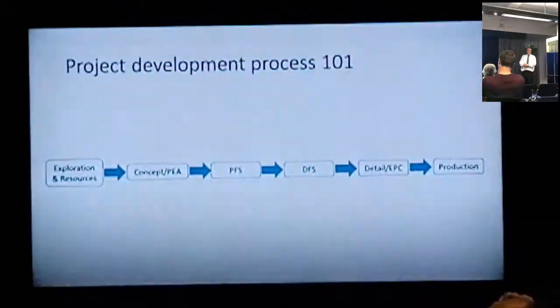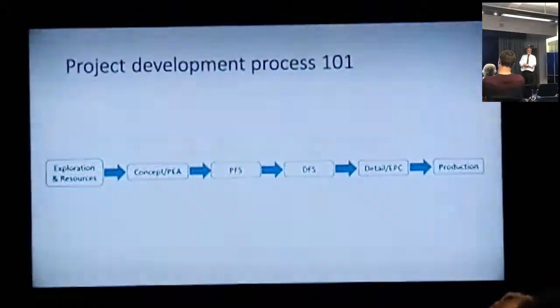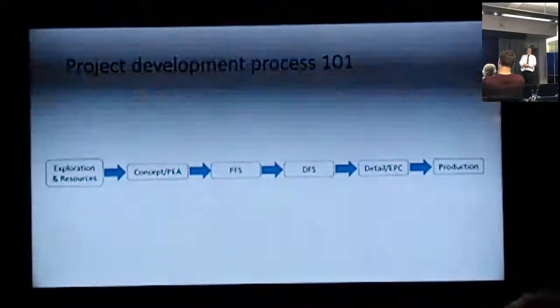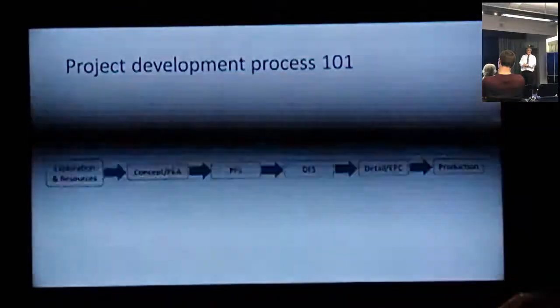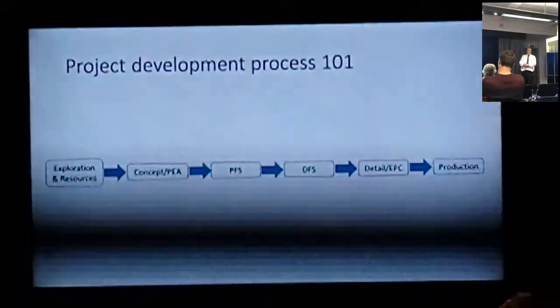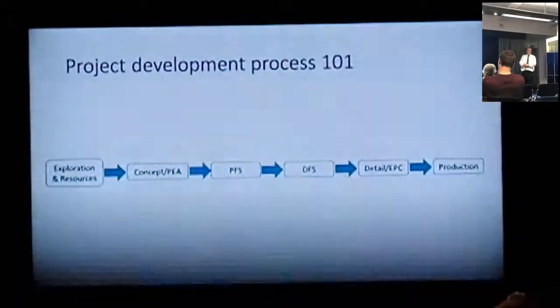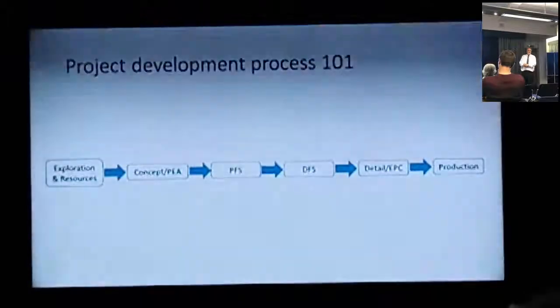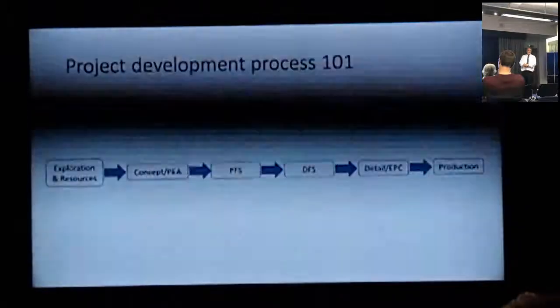Just to put you through the project development process 101 in very simple terms — exploration and resource target generation leads to a concept or preliminary economic assessment, a PFS (preliminary feasibility study), a definitive feasibility study, then into detailed design, EPC, and eventually, hopefully, a productive mine.